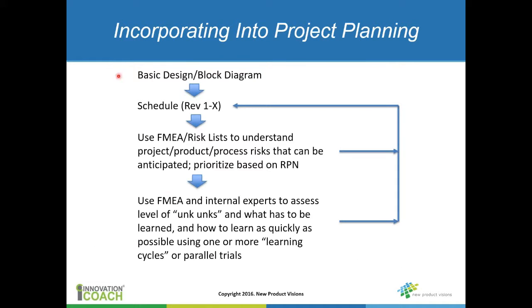So really how this kind of plays out in terms of project planning is that, from my experience, when we start a project, we usually have some type of basic design, maybe a block diagram to start off with. From that basic concept, we start to lay out a really high-level schedule, probably driven by some of the high-level deliverables that come out of our phase development process. For instance, we know we need to do X number of cycles of prototypes. We know we have to do regulatory approval. So we have some really key milestones.